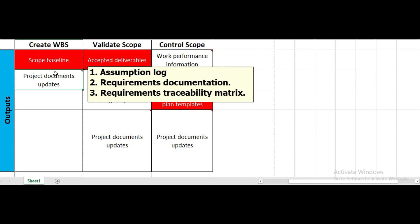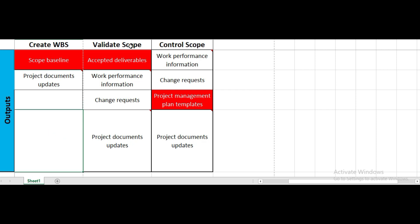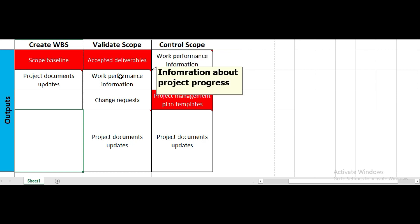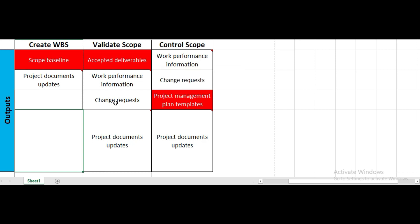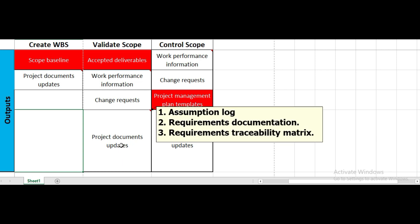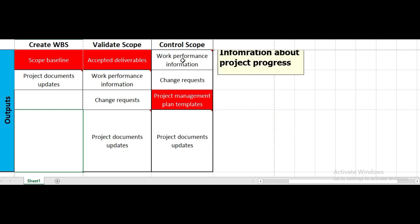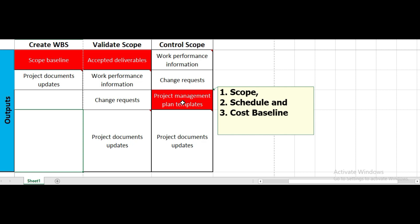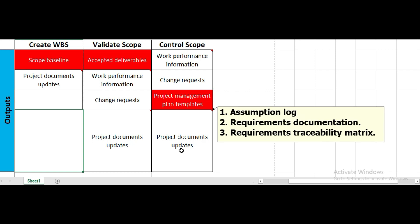In validate scope, the outputs are accepted deliverables approved by customers or sponsors, work performance information regarding project progress, change requests, and project document updates including the lessons learned log, requirements documentation, and requirements traceability matrix. For control scope, outputs include work performance information, change requests, project management plan updates — such as the scope, schedule, and cost baselines — and project document updates.